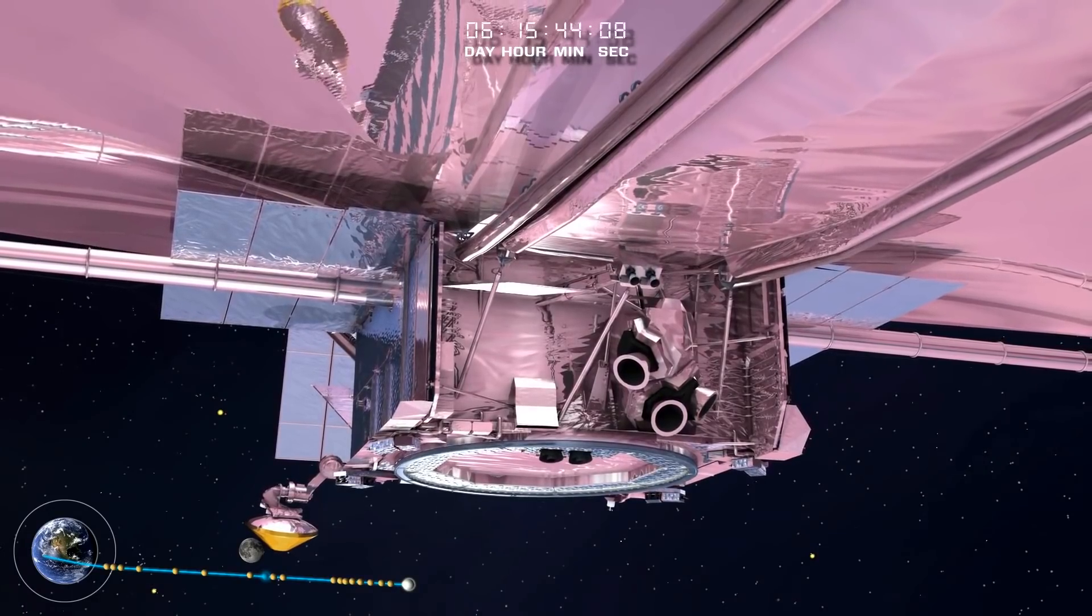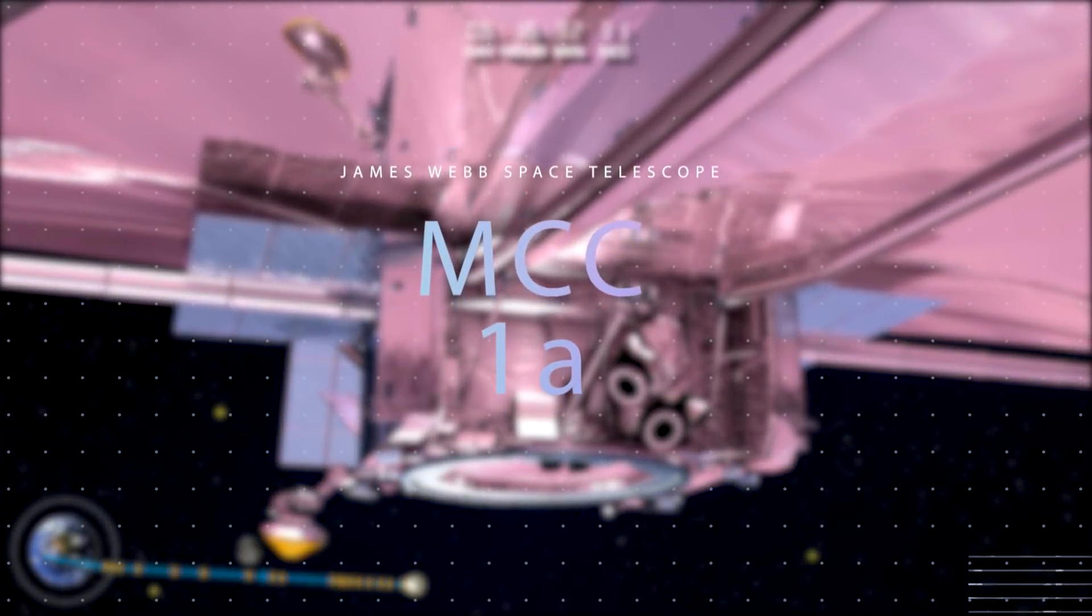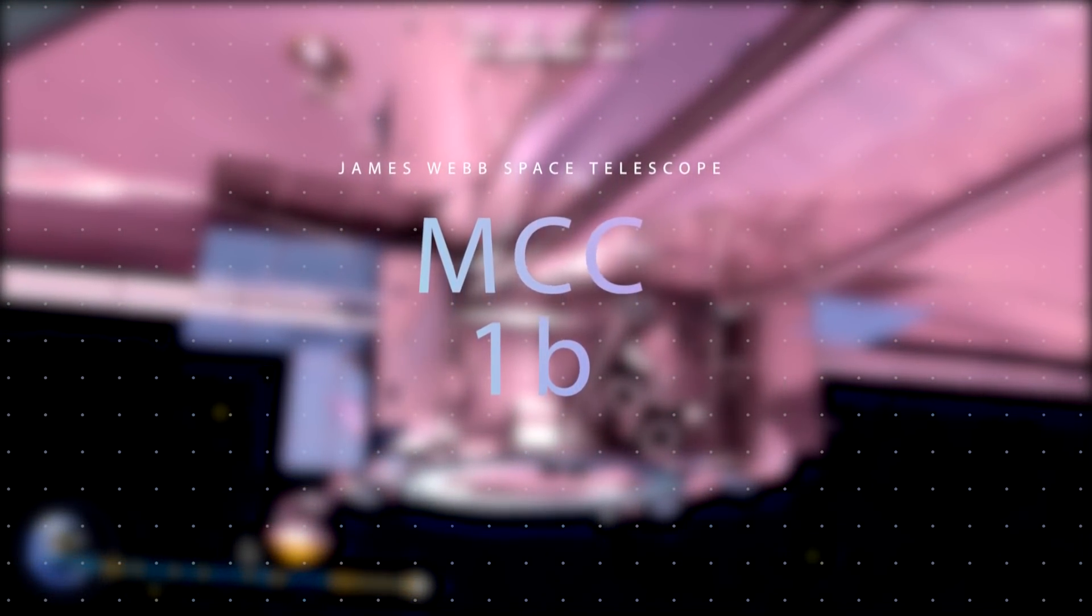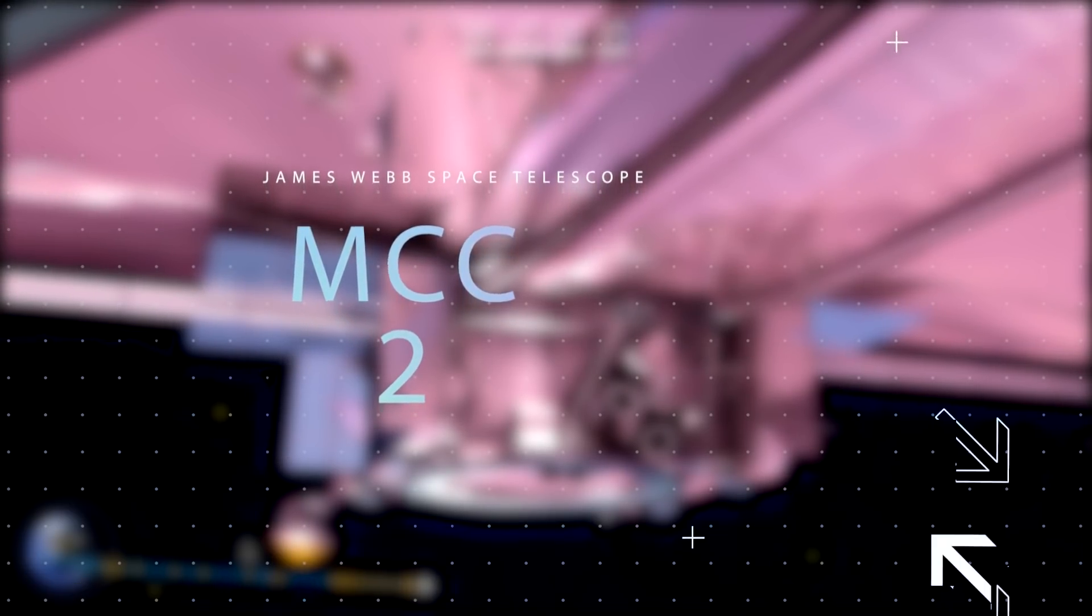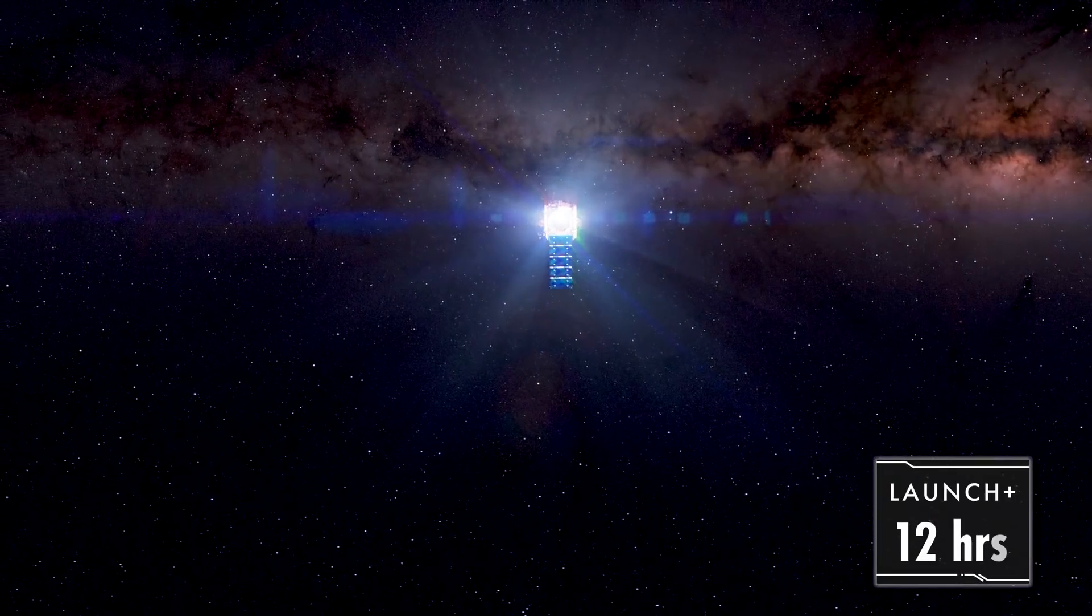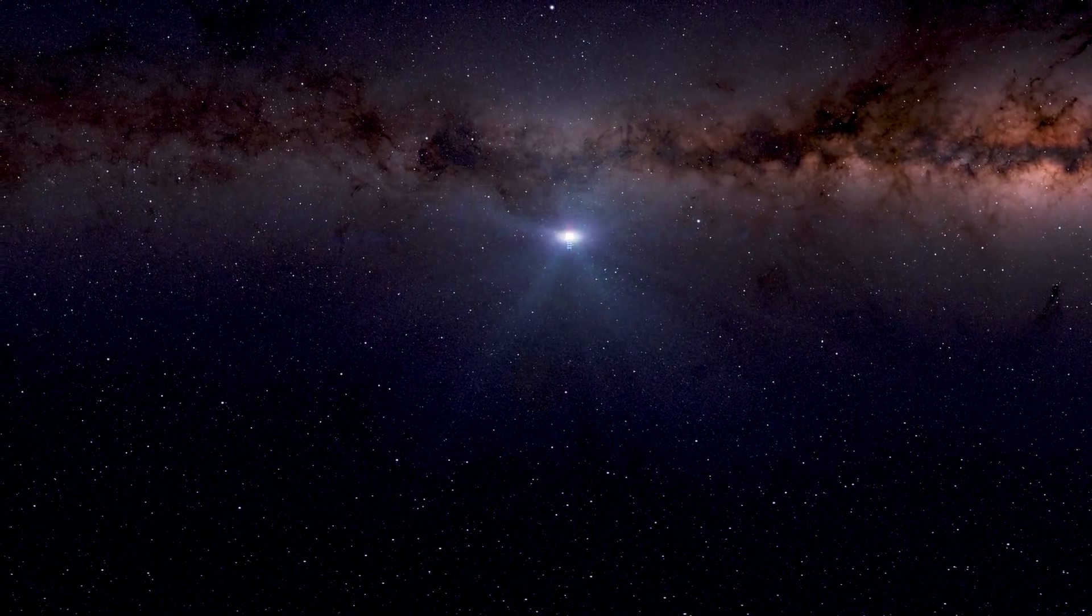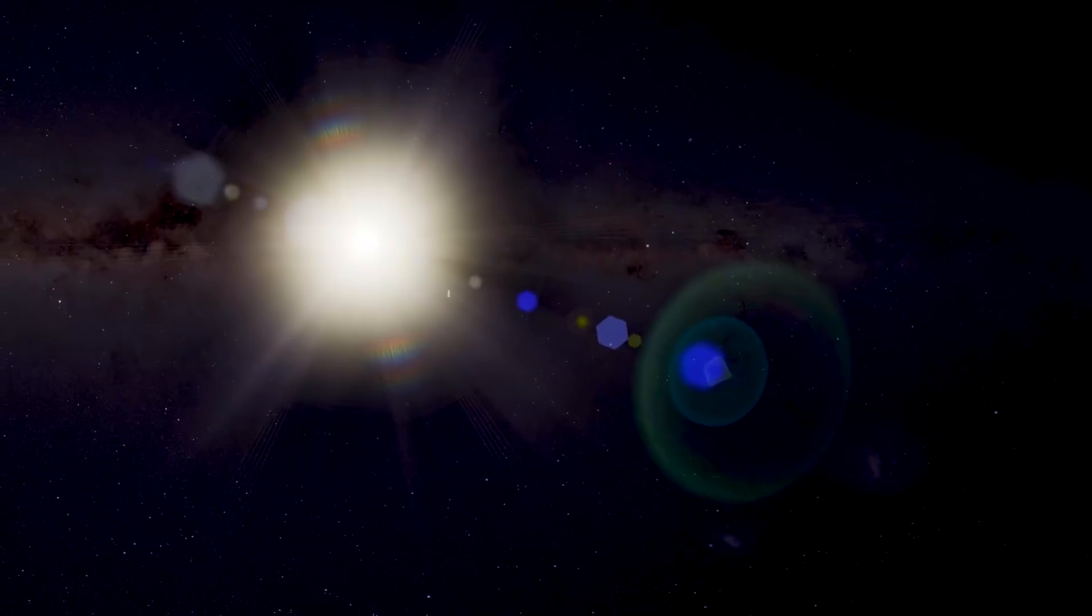There will be three mid-course correction, MCC maneuvers: MCC-1A, MCC-1B, and MCC-2. The first burn, MCC-1A, is the most important and the only other time-critical operation aside from solar array deployment during Webb's commissioning period.